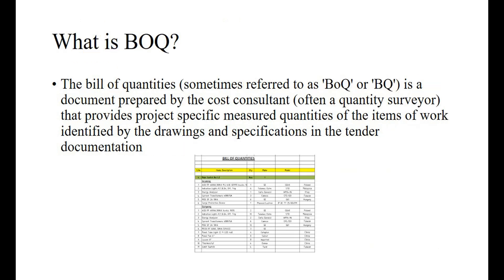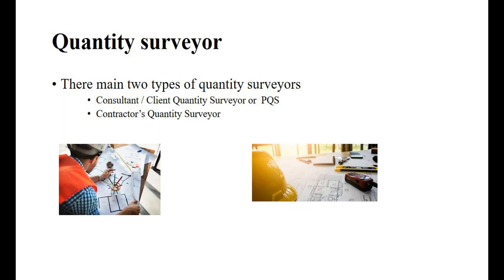Quantity surveying's main job is preparing BOQ. What does BOQ mean? The Bill of Quantities, sometimes referred to as BOQ or BQ, is a document prepared by the cost consultant — often a quantity surveyor — that provides project-specific measured quantities of the items of work identified by the drawings and specifications in the tender documentation.